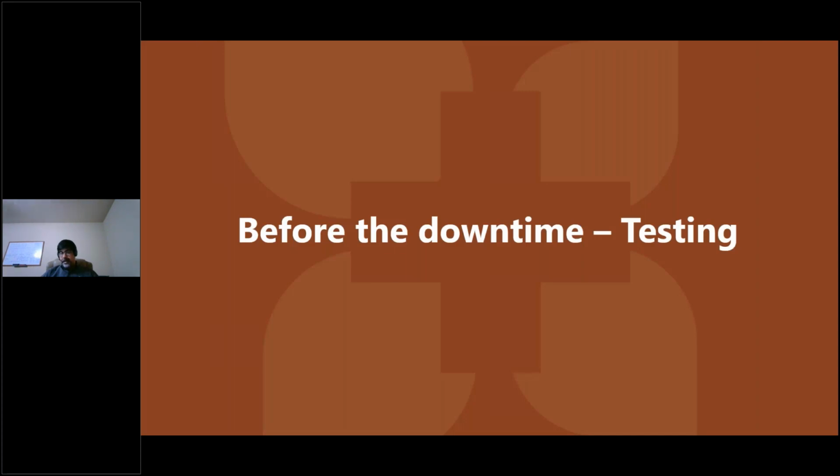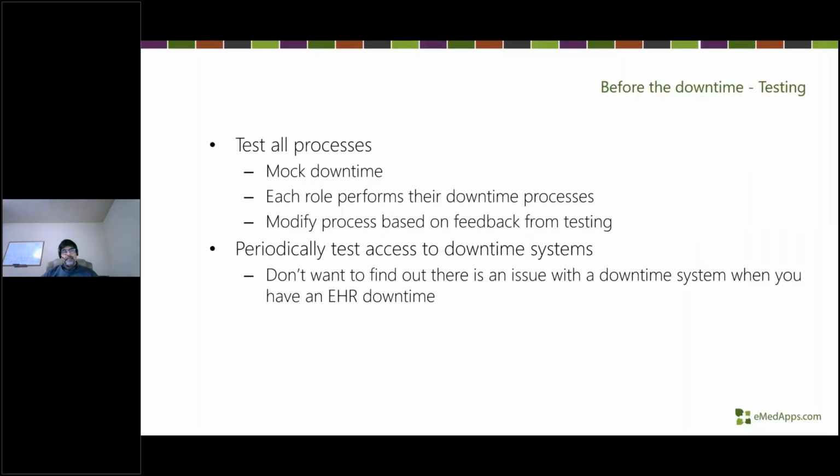Testing your downtime process. You want to make sure you test all of the processes that are involved. The best way to do this is a mock downtime, right? Take a section of your staff and put them through a mock downtime. Don't let them use the EHR system. Go through a mock of your downtime processes.